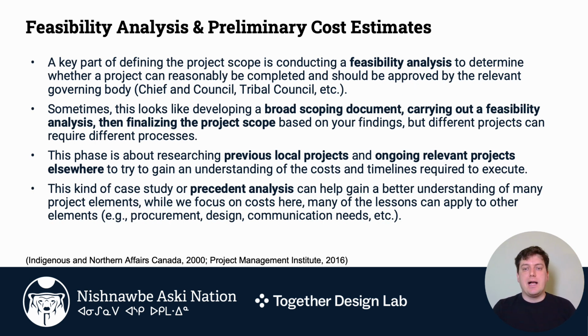What is a feasibility analysis? Really, this is about making sure that your project is financially viable, that the vision you're putting together of what this house will be is something that you can afford. And this should be one of the primary inputs for your scoping statement, as I said, that we created in the previous module. If you can't afford what you're describing in that statement, then the project shouldn't move forward, and you should take a step back and describe another house or another project, or find another solution.